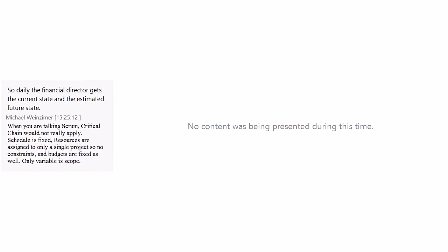What you can achieve, and we do this in some of our Agile presentations, is come up with resource management, and every time you assign your resources in your Agile environment, this gets reflected in your PPM and gets blended with other assignments on the PPM side, where you can use the resource capacity planning capabilities of your PPM, which would already include all of the Agile assignments. So this is where you can run your resource management capabilities.